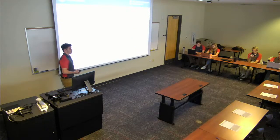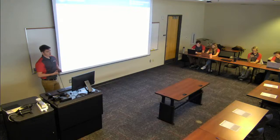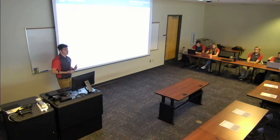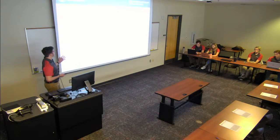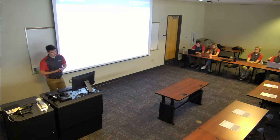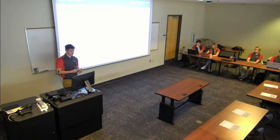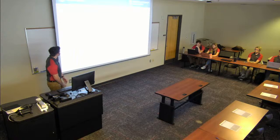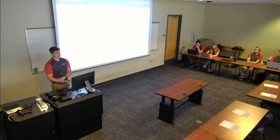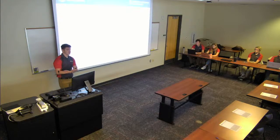So with any project, there are obviously risks to success, so it is important to identify them. And I'll speak on the next slide on how we're going to go about mitigating these risks. So first is time shortages. Everybody has a busy schedule, and sometimes with the nature of the team, every meeting is a build meeting. So you can have a few hour meetings, but it's important to stay on track. We have to make sure that we don't fall behind and then are pushing at the end of the year. Fabrication errors is another one. That could be a poor layup that's leading us to an out of tolerance part. You can have breaks or cracks as well. C being integration failures.